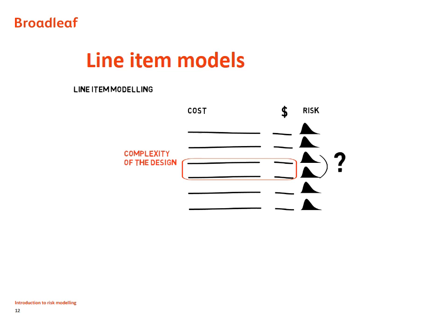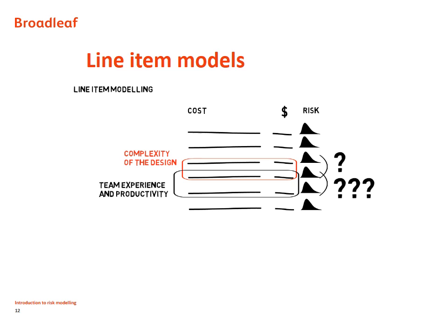It gets worse though. Imagine that one of those costs is also linked to another one, because they depend on how good a development team we will have and how productive they will be. Assessing the correlation between the cost uncertainties is now even harder, because the first two are correlated one way, the second two are correlated a different way, and without getting into the statistics, this actually means that the first and the third will be correlated to some extent.